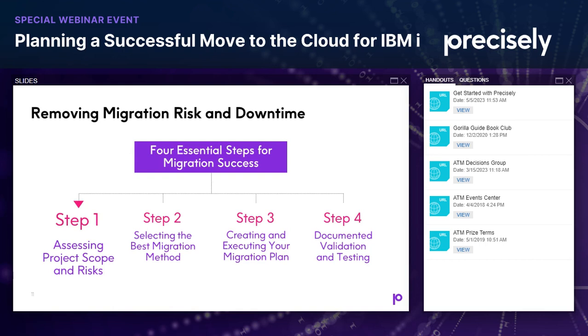Looking at your third-party software, that's one thing. We've run into, believe it or not, some customers whose applications cannot run past a certain OS level. So you don't want to make any assumptions. You want to validate it with your third-party software. Speaking of which, you want to make sure that you get new keys for the new systems. That is often overlooked until the last possible minute and can bite you in the keister, if you know what I mean.